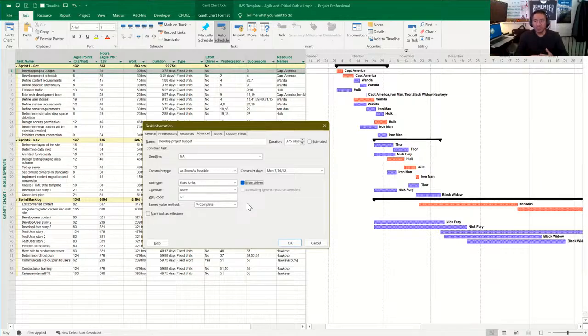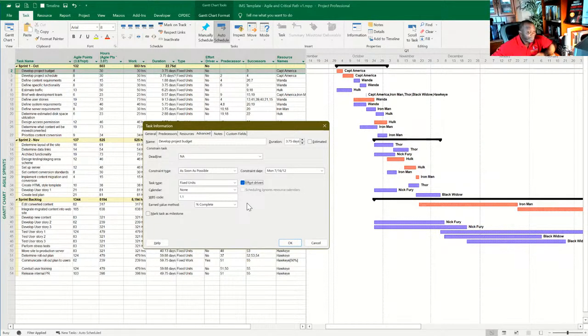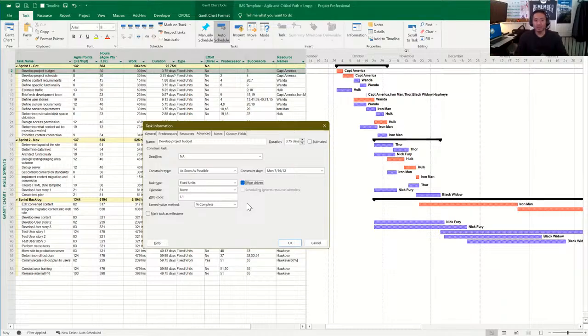Because once you start digging down to resources, putting down actual names, it can be seen as arbitrarily added, and then that's a breach of the contract and the agreement. So sticking at that generic level, it's a safe spot for a scheduler.